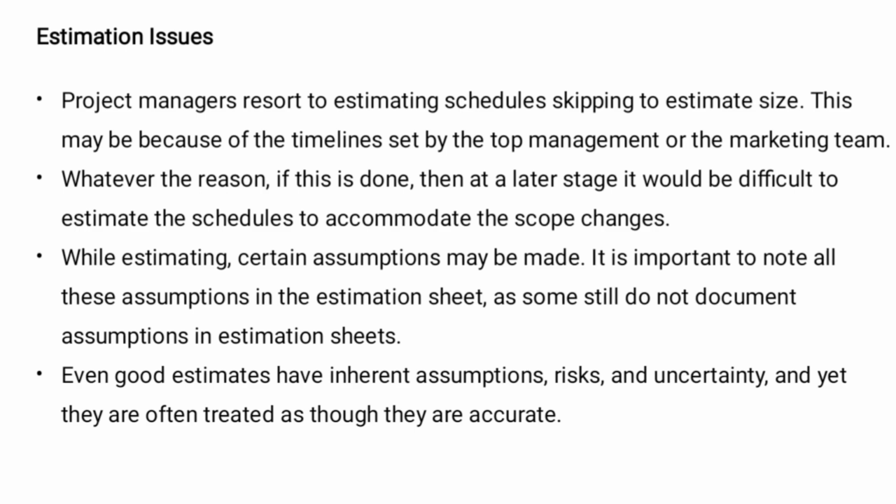Whatever the reason, if that is done, then at a later stage it would be difficult to estimate the schedule to accommodate the scope changes. While estimating, certain assumptions may be made. It is important to note all assumptions in the estimation sheet, as some still do not document assumptions in the estimation sheet.